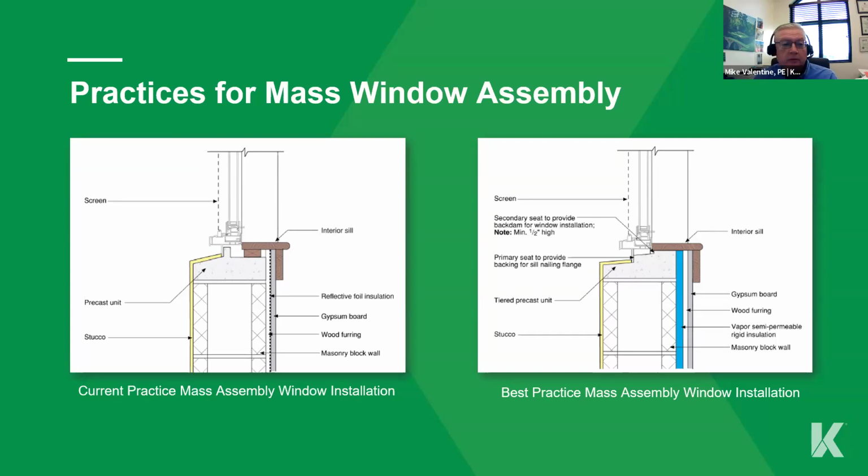Sometimes you come across a building where you do not have existing drawings or even the truss manufacturer's out of business. So in that respect, yes. But 9 times out of 10, we try to make sure you go back to the original truss designer, but we can certainly provide analysis and reports on any trusses that are damaged and see what the cause and origin was.